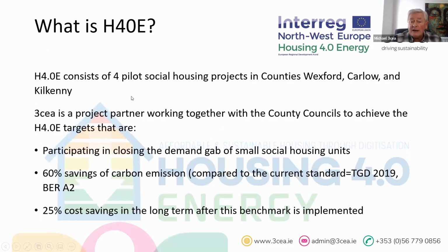We were originally to put in housing units, trial sites, in counties Wexford, Carlow and Kilkenny. For various reasons, Carlow and Kilkenny are the only two going ahead. Wexford won't be going ahead. Carlow and Kilkenny have already started on site. Those contracts were awarded approximately a fortnight ago, and we were just in the process of putting time-lapse cameras onto them to record their development over the next 6 to 9 months. We've been working closely with the county councils and have had great support from them.